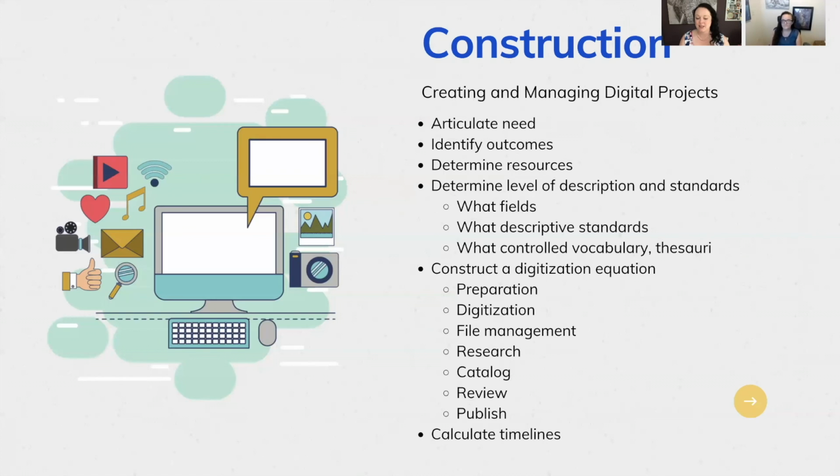Then you're going to need to think about file management, the research you need to do to learn about that object so that you can catalog and write that descriptive data, and then the reviewing and the publishing to whatever platform you use. So with all of that in mind, calculate the time it will take you, your staff, or a vendor, and bring out that whole timeline from starting to ending.